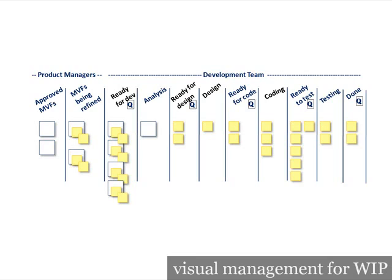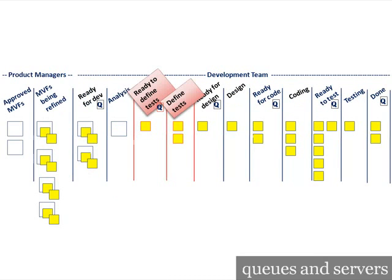In the real world, the Kanban board might look something like this: I'd have a backlog, a queue for development, a queue in testing. There would be some large queues here because typically as you work on things now, they don't really flow through smoothly — we have queues and delays. If we start Kanban with our existing flow, one of the things we should be asking is: how do I smooth this out? Obviously I've got a lot of stuff waiting for testing and a lot waiting to be developed, so I need to put pressure on the product manager side saying 'don't overload the team' — and on the testing side, I've got to figure out why testing is backed up.